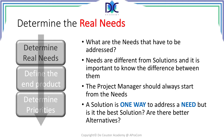Needs and solutions are not the same. We have to understand their difference and the project manager should always start from the needs, not from the solutions. When you give a solution to a project instead of the need, you only have one way that you selected to address the need. There may be more solutions possible, and it is the task of the project manager and the team, together with the client, to identify the best possible solution. When you have a solution, the first thing you have to ask is: what is the original need, and are better solutions possible?